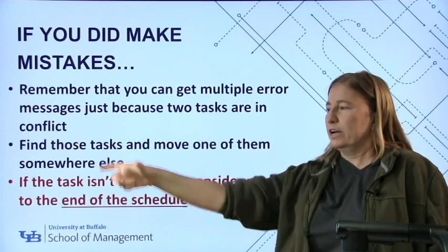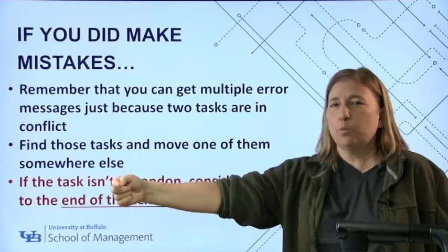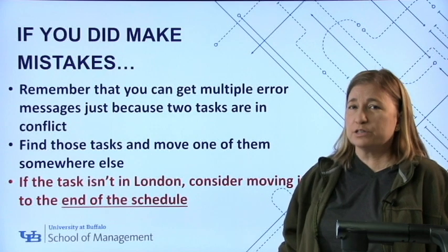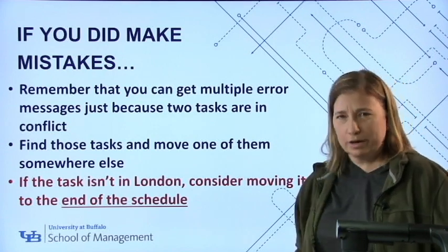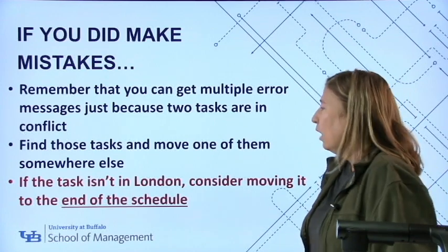And then schedule the task that you're trying to move. Just tack it way on the end. You're not going to win any prizes for length of schedule, but that's not the point. We just want the congratulations message, and this is a very fast way to fix something like that.